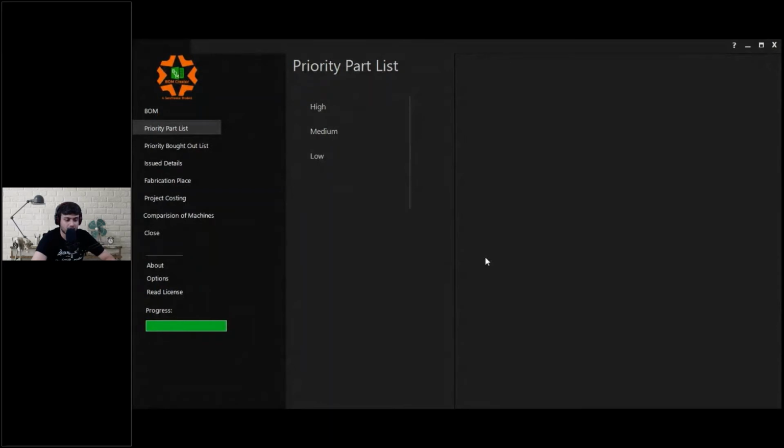As a designer or planning person, I will take first the items which will take more time to get manufactured, then the items which take average time, and the items getting manufactured in short time at the end. This keeps more buffer for the items taking longer time, which is the reason I consider them first.